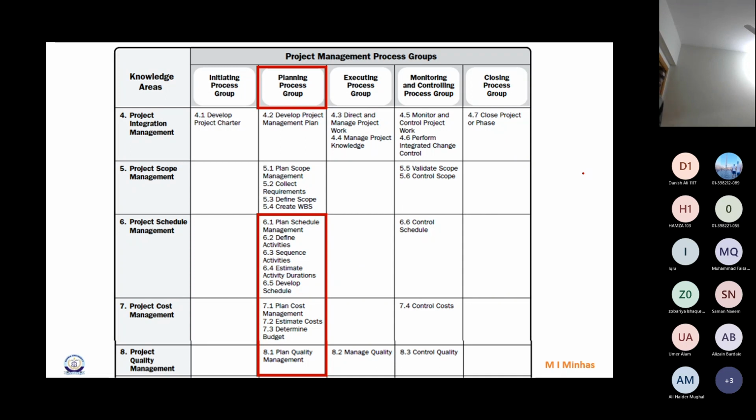Now, as a result of this, there was a quality person who ensured that process, people knew the process, and we got deliverables, right? But despite the fact we ensured everything, we still need to check the deliverables. So we need to carry out midterm exams, to evaluate that, okay, despite all those checks, are we getting the desired output or not? So we will get some deliverables, and those deliverables would be sent to control quality. Is it clear? To control quality for monitoring.